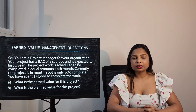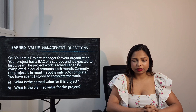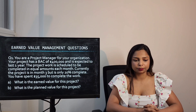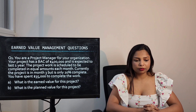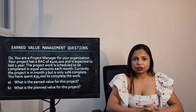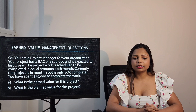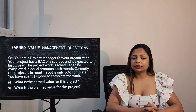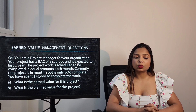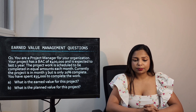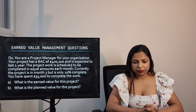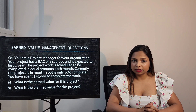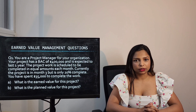Now let's try to solve some questions based on the Earned Value Management terms and formulas. Question 1: You are a project manager for your organization. Your project has a BAC of $400,000 and is expected to last one year. The project work is scheduled to be completed in equal amounts each month. Currently the project is in month 3 but is only 20% complete. You have spent $35,000. Calculate the Earned Value and the Planned Value for this project.